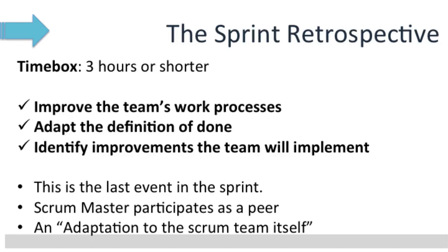While these improvements and others may be implemented any time, the sprint retrospective is a good point to bring them up, and one of those should be a high priority improvement that should be put in the product backlog for the next sprint to use.